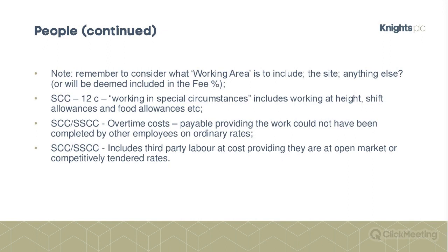But, and again, this is a series of checks and balances, overtime is payable providing that the work couldn't have been carried out by other employees who were on site on their ordinary rates. So this is to avoid a situation where certain people are working overtime and getting paid, and others are sat around doing nothing, and poor old client has to pay for everything.